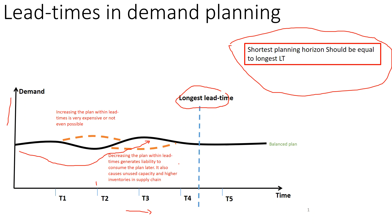As a result, you will be building liability with you. This kind of thing mostly happens in the electronic industry, mostly in the phone industry. Say you launch a product, you have ordered the components, but suddenly you see a demand drop. Since all the POs have been placed and the demand drop happened within the lead time, you can't cancel it and as a result you build up liability.